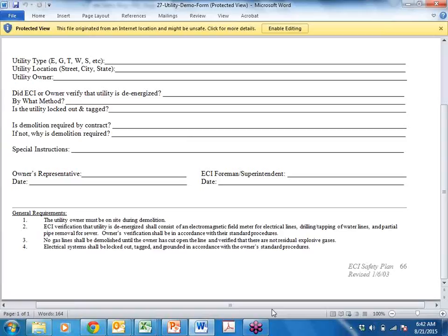You don't know whether they just capped that service or turned it off, so you want to call the three providers to come down, scope it out, and check who's got what. Have them make that decision. Yep, exactly.